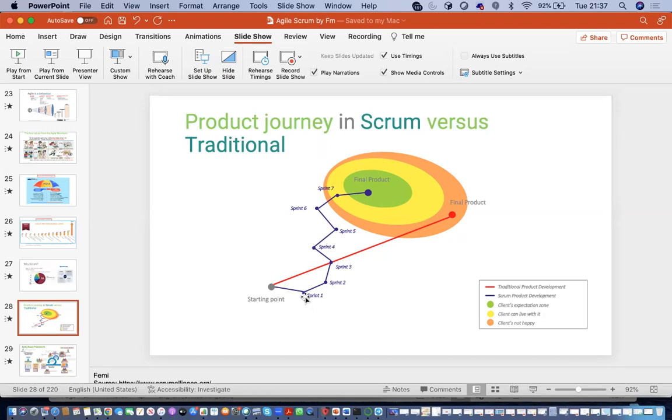So one of the things you want to make sure your team does, apart from some of the things that I've taught you, is the fact that your team needs to be able to work in an agile way of working. It doesn't have to be Scrum. It could be Kanban. And if we have time, we may touch about what Kanban is as well. So if you look at this, he has sprint from 0 to sprint 1, sprint 2, sprint 3, sprint 4. Every time when he finishes a sprint, this sprint can be 2 weeks, it can be 3 weeks, but maximum 4 weeks. We don't allow it to be more than 4 weeks.